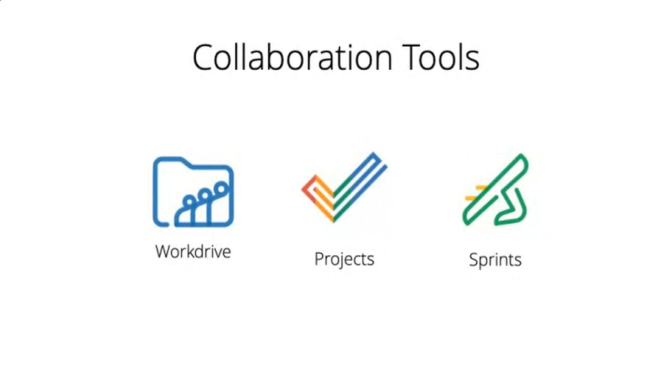So instead of it saying, all right, part A will be 1 month, part B will be 1 month, etc., you're saying, all right, I think this will be about this hard, this will be about this hard, and it's a little more focused on guesstimating as you go. So it's really all about adapting to change, and it can be really valuable for teams that are developing new things or designing. So in general, software development teams use it a lot, so do UI teams.